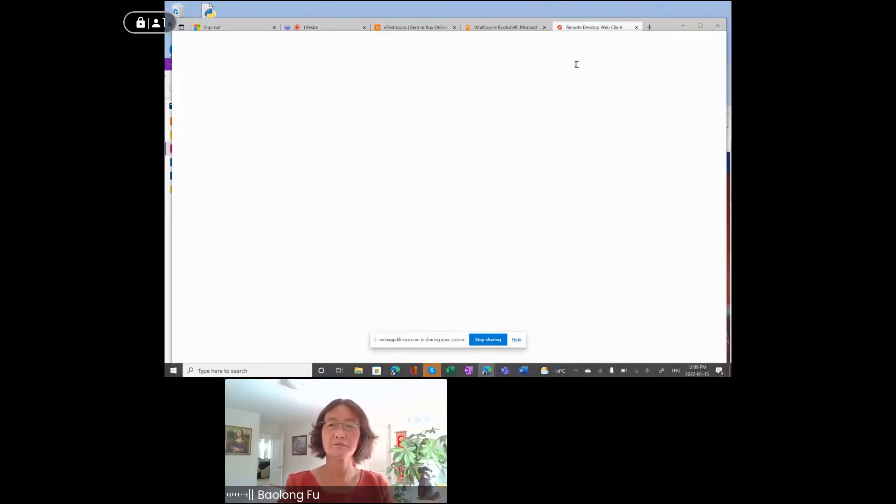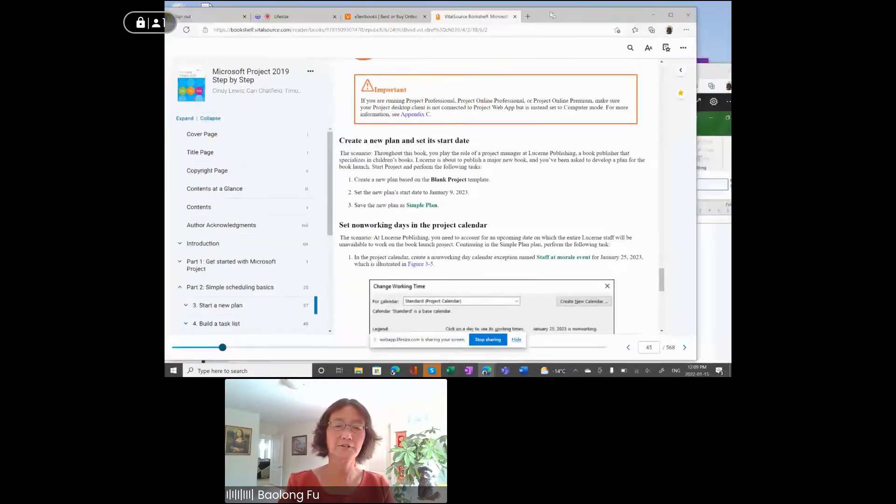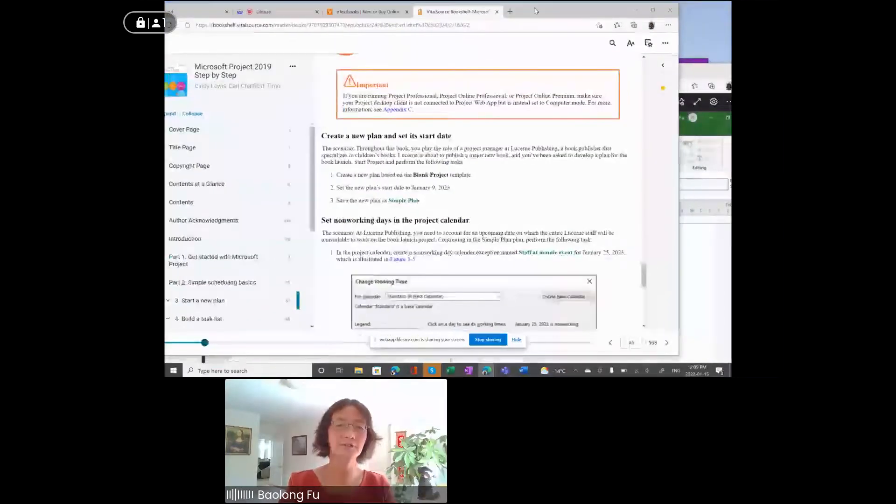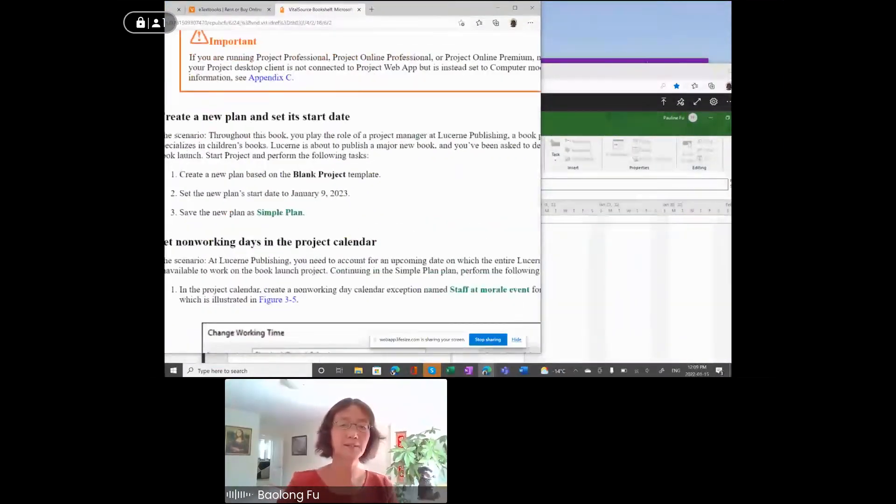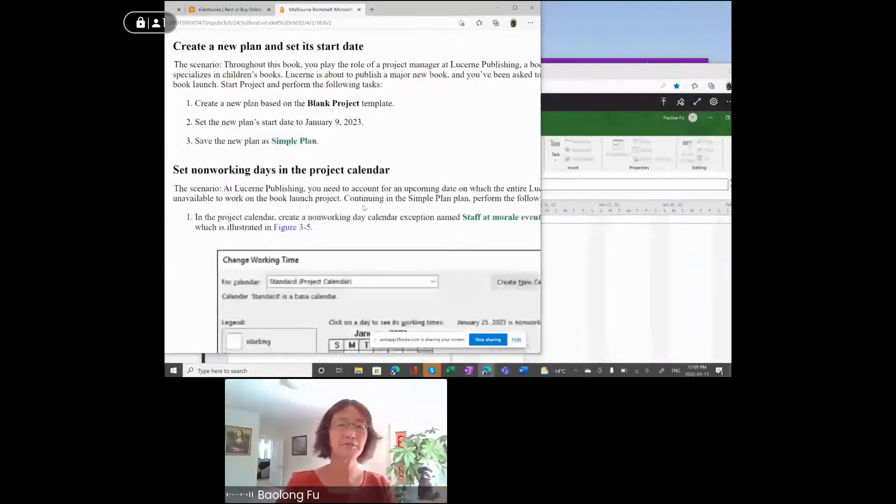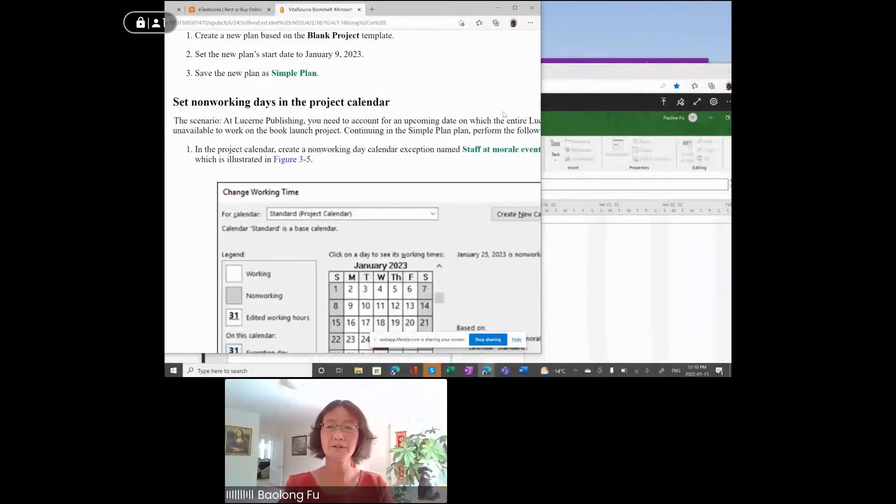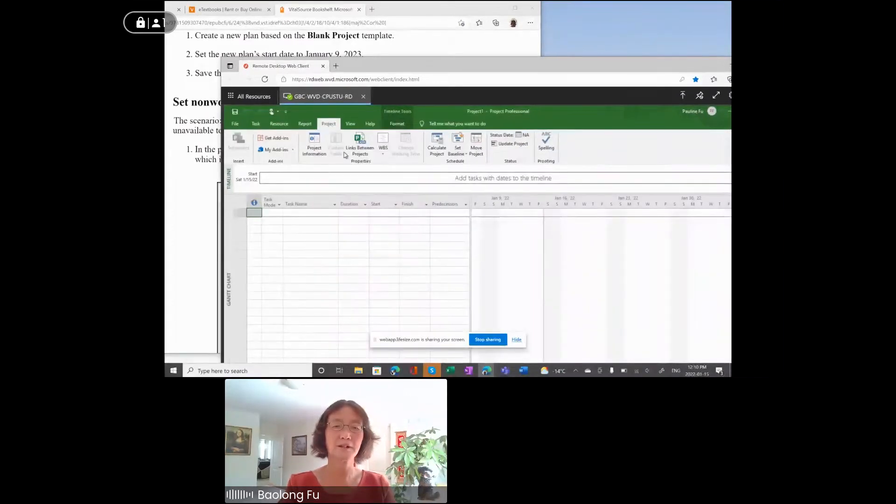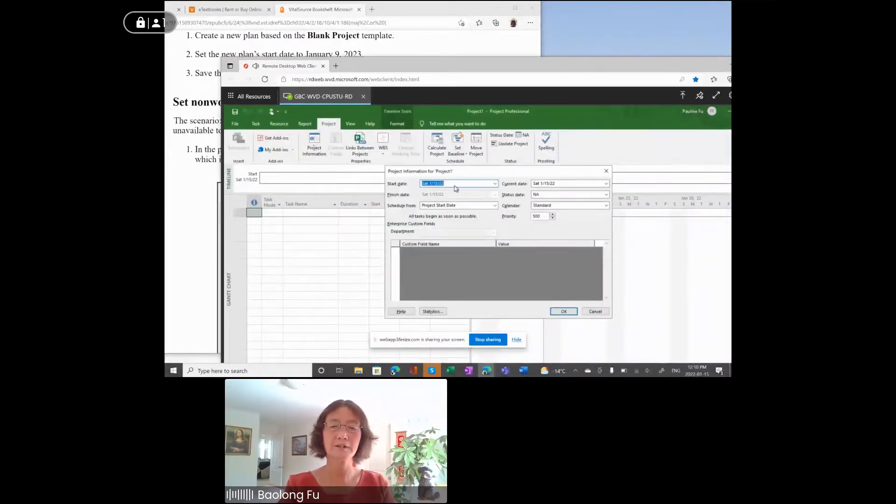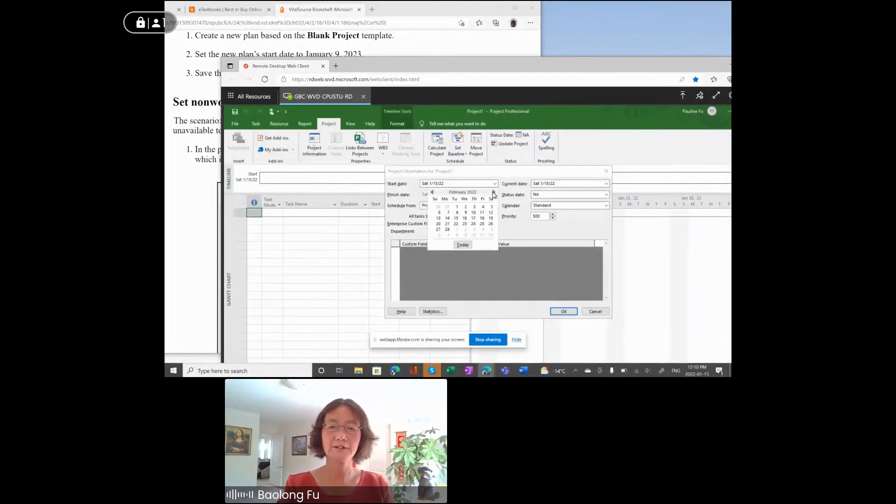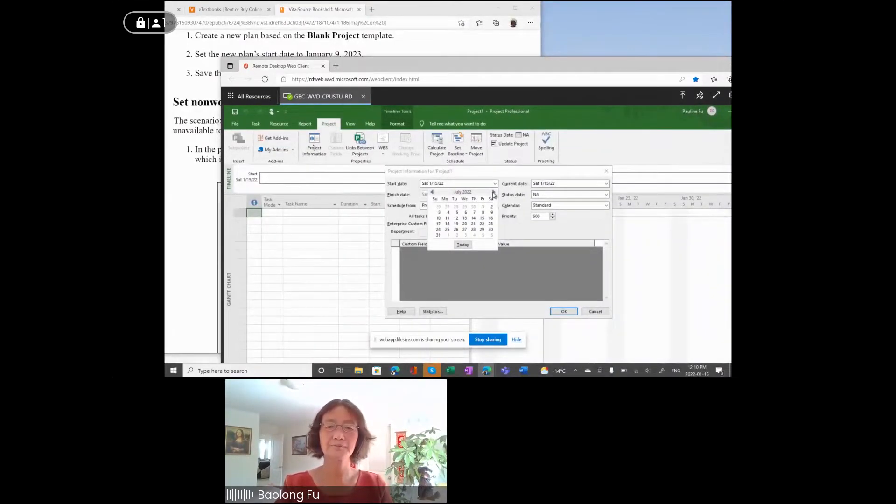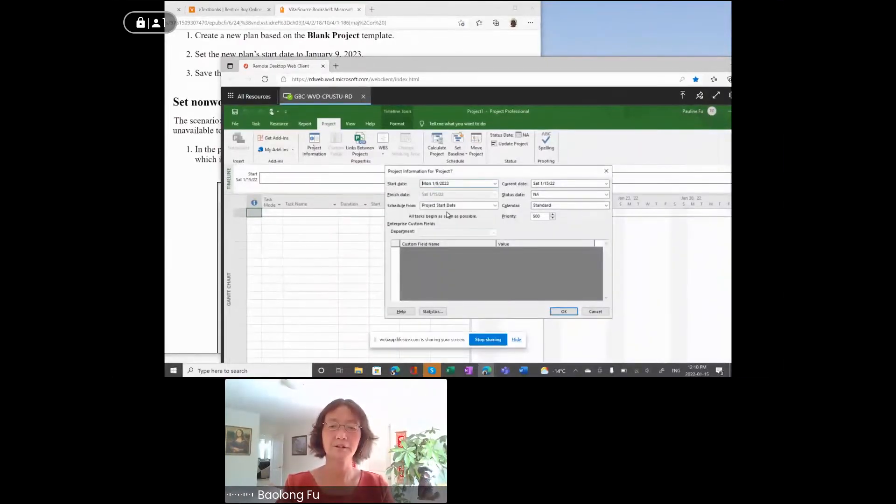Try to move this window so that you can see the instructions. Step two, set project start date to January 9th, 2023. Go to Project, under ribbon, under Properties group, click Project Information, and then under Start Date drop down list, select January 9th, 2023. Click OK button.